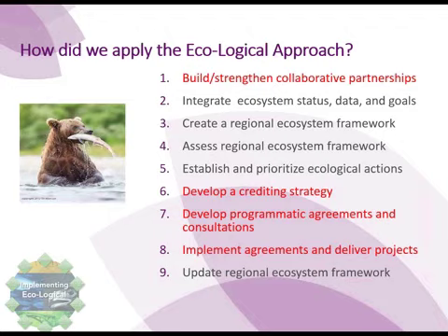And what we found is that projects with a check mark next to endangered species on our main CE checklist couldn't receive NEPA sign-off until Section 7 was complete. And by complete, that meant that the BO was complete. Now, our U.S. Fish and Wildlife here in Maine was requiring very specific details about projects right down to construction, placement of erosion and sedimentation control.